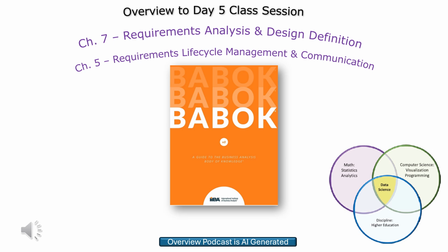Okay. The chapter highlights 3 key elements for change assessment: assessment formality, impact analysis, and impact resolution. All right, let's look at assessment formality for a moment. Okay. This is how rigorously you're going to evaluate those proposed changes. A minor tweak might only need a quick review, an informal approval, while a major overhaul could require a detailed impact analysis, risk assessment, formal sign-off. Okay. So you're tailoring your approach. So not being bureaucratic, just being smart.